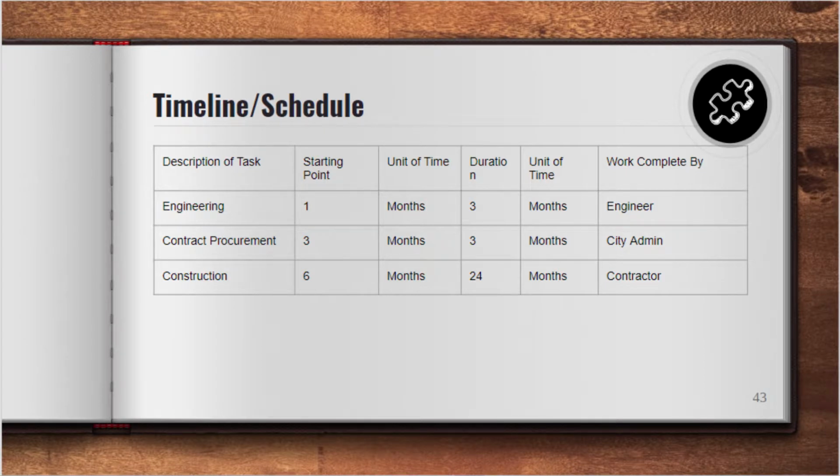So yeah, 4 or 5 steps for your plan. Make sure, even if you don't put it in here, you need to be aware that there is a lovely closeout process at the end of the planning. So give yourselves that window, because that takes a while to get, especially adoptions at the end of a plan. You can't think, well, we're going to finish writing the plan a month before the period of performance, because you're required to have all your communities adopt the plan. And as you know, working with politicians and community committees, it can take a while to get on their agenda and to get things formally adopted. So make sure you're aware that you're going to need that cushion of time at the end.